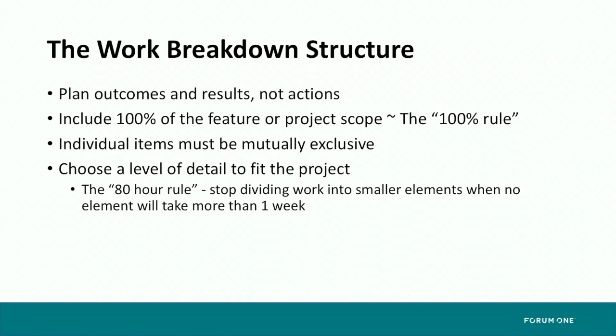I sat down with another developer, and we just whiteboarded, here are the 15 things that have to happen, starting from deploy this particular Angular 1 library, all the way down to press the button to do the code integration on Git and the deployment to production. So we came up with those 15 things, and we did our work breakdown, and we associated a number in hours with each one of those, and we added that up.